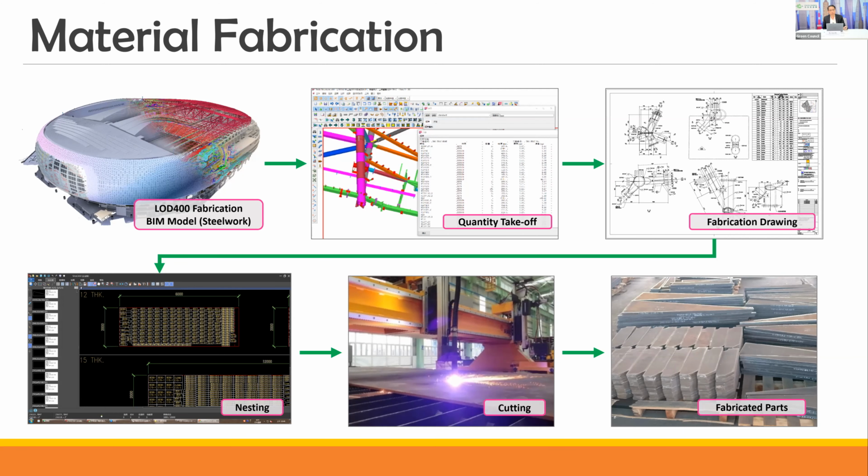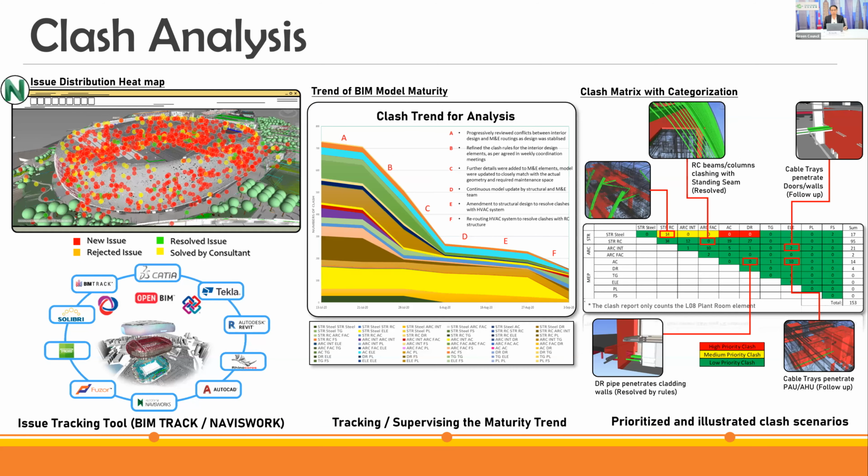During the construction stage, it is a big problem for the construction team that the building surface works and the building structures may clash together. So BIM can help to find out all clashes and then propose the best methods to avoid them. So this can eventually avoid abortive works, double handling and material wastage.